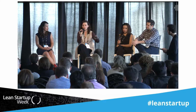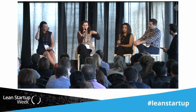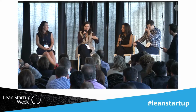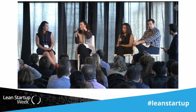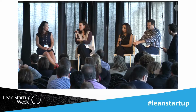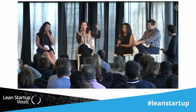How do I view my work and my career? And then the remaining 2 weeks we iterated based on all the feedback and knit these things together, worked on prioritizing and getting ready for that big executive meeting where we did the final prioritization for the V1, for the MVP product, and we actually called it the MVP product. So that's how we broke down the tasks in terms of there's this huge